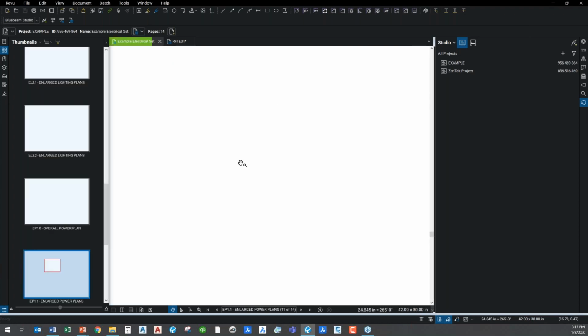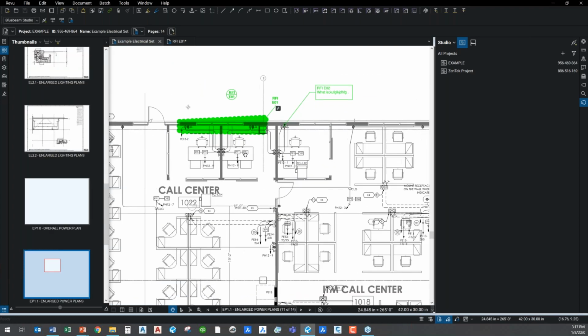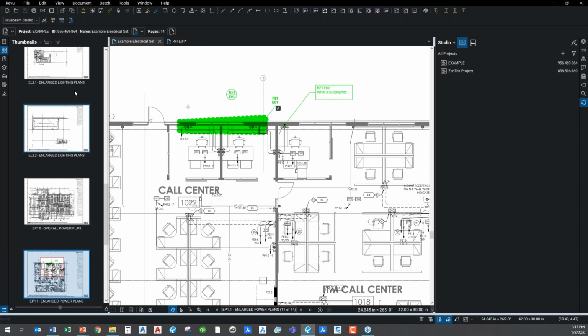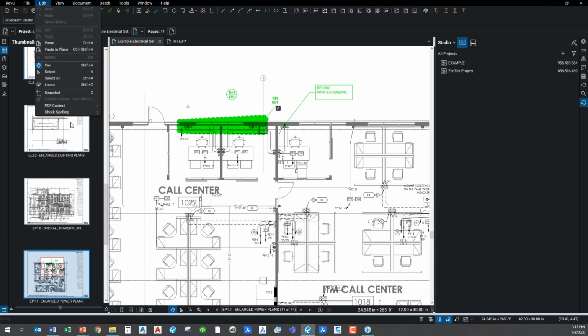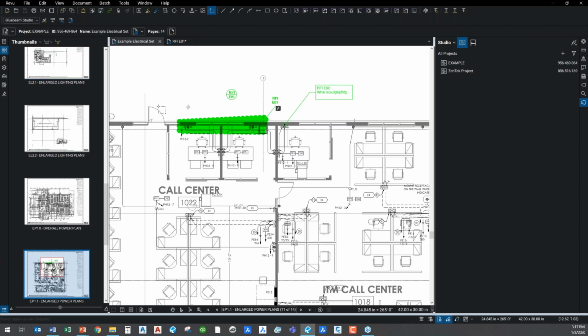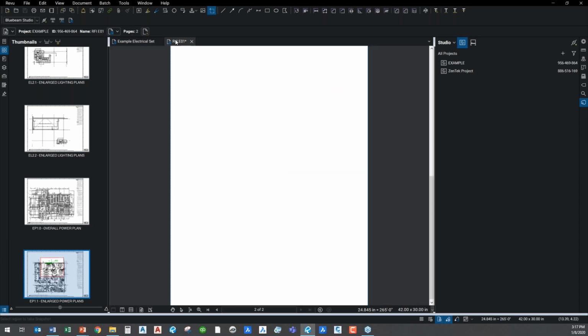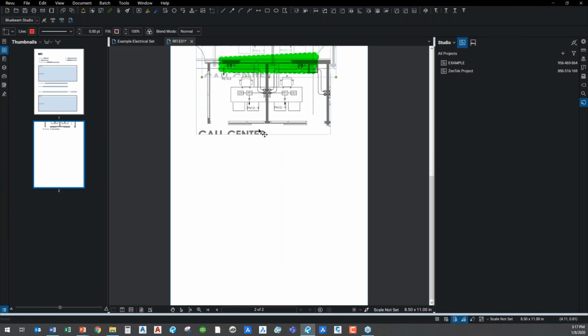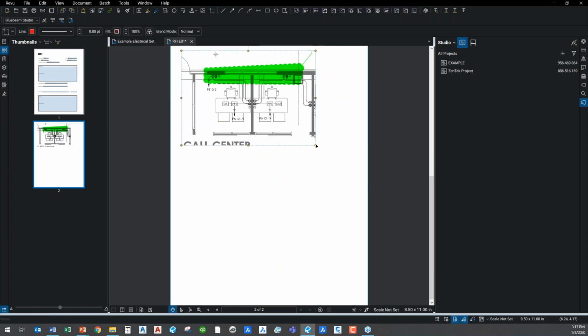Instead, what we can do here is that inside of Bluebeam, when I go in here and I need to say, hey, what's going on in that area, I can tag the RFI here, right? But the other thing that I can do is go up here and create a snapshot of this area, right? So I can go in, create a snapshot of that region. Then I can go over to the actual RFI itself and I can just paste it in, right? And you see I can actually paste it in.